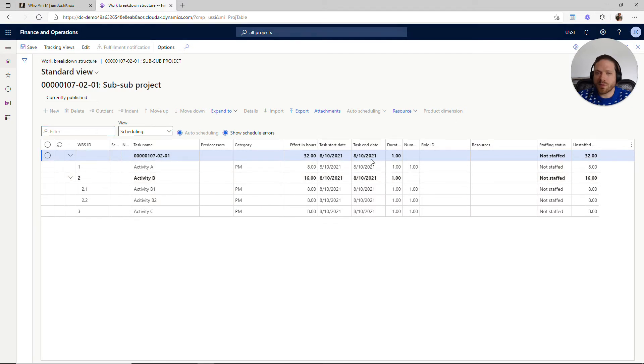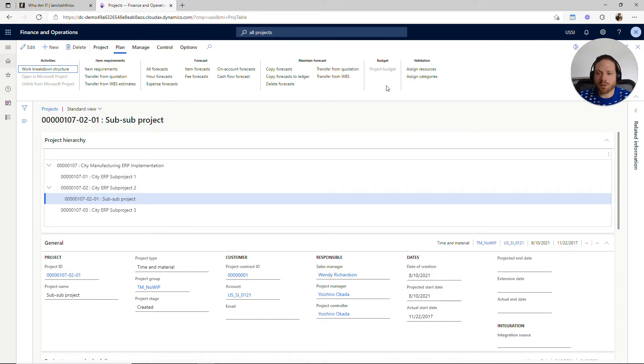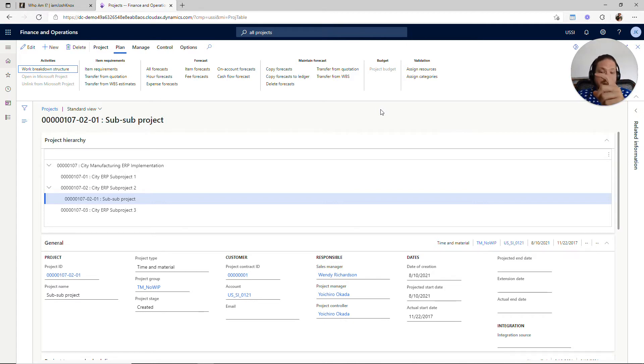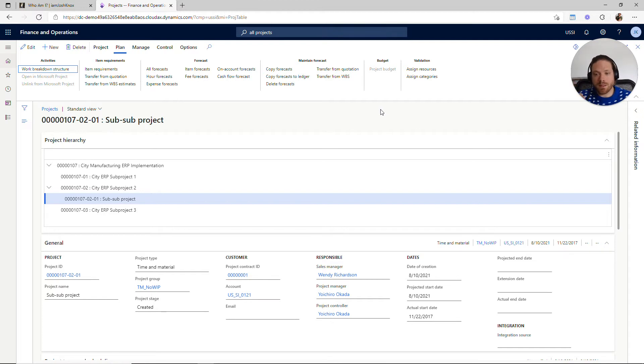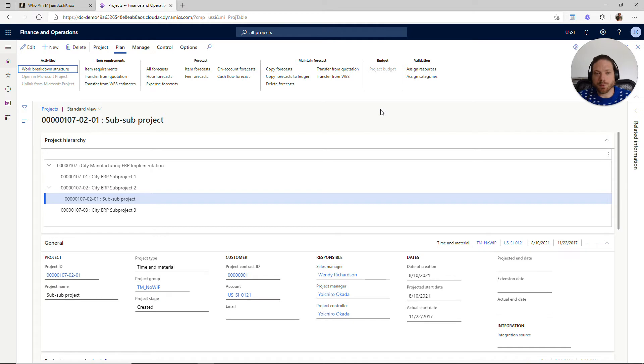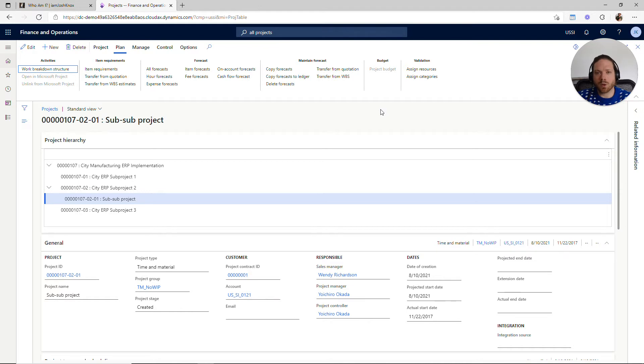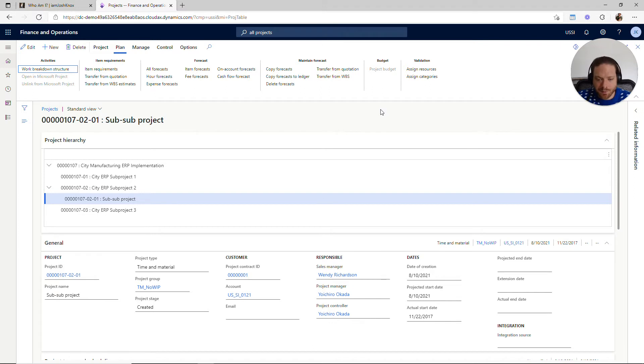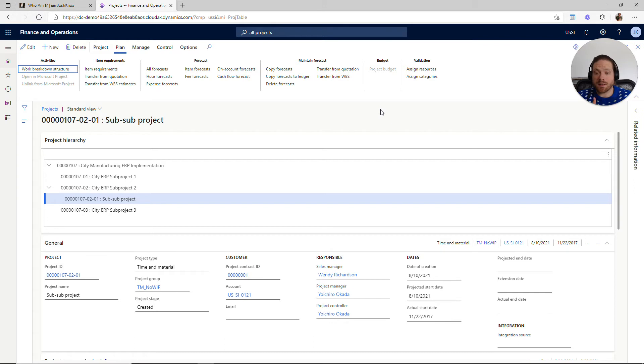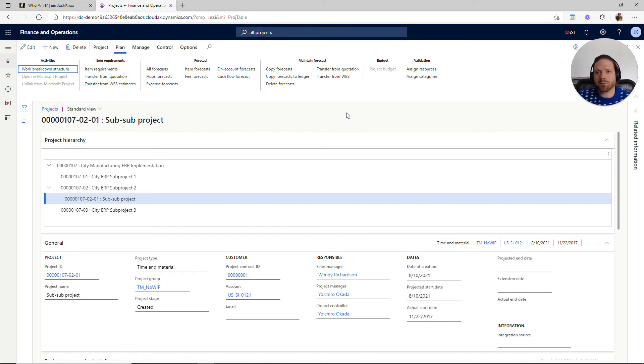So the hierarchy as we were talking about goes: I have a project contract, underneath my project contract I might have one or many projects. Each of those projects can have one or multiple sub-projects, and then under each of those sub-projects each one of those can have its own work breakdown structure, its own set of activities for the micromanaging of the project. I'm sure a project manager probably doesn't like that term, but you can get very granular if you want.